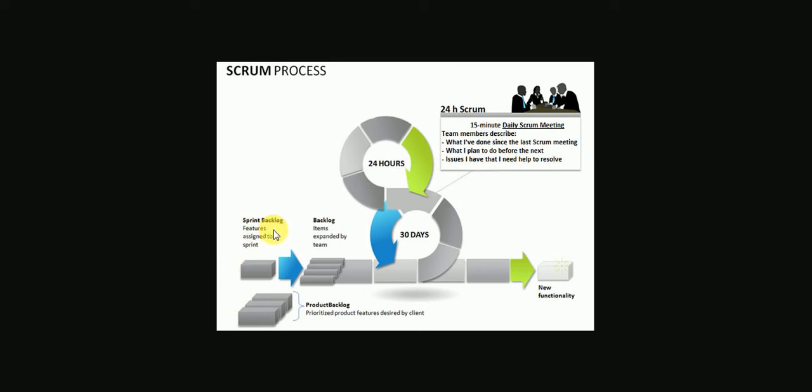Sprint is done for ideally 2 weeks. There might be a few software development teams who can work on a particular sprint for 1 week or more than 2 weeks. It depends upon the priority, severity, as well as the scope of a particular product feature which needs to be delivered at the end of the sprint. So sprint is nothing but a work timeline, a delivery timeline which the development team has to work upon,